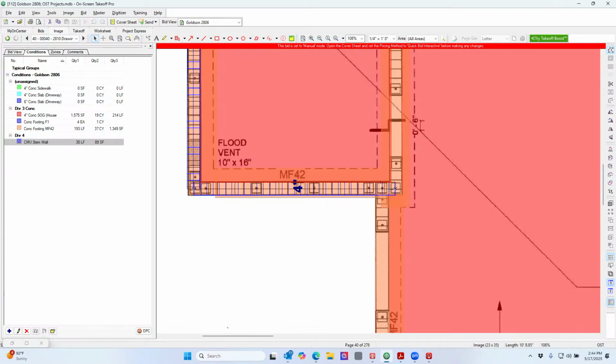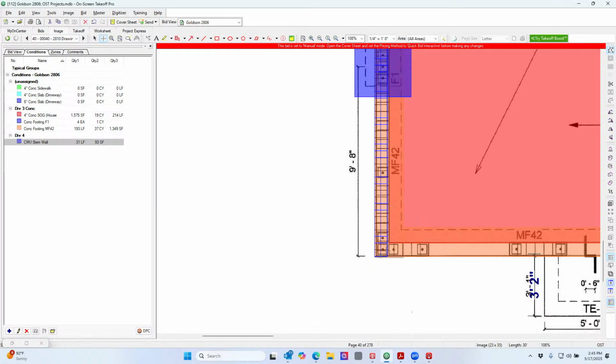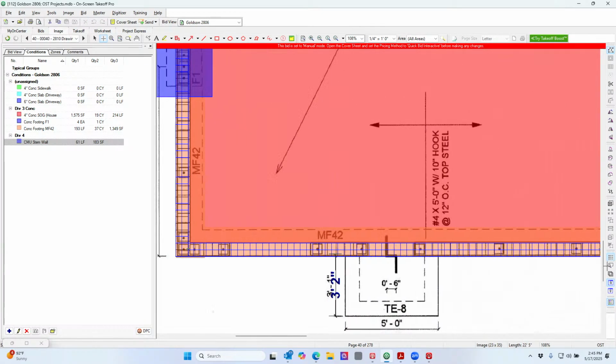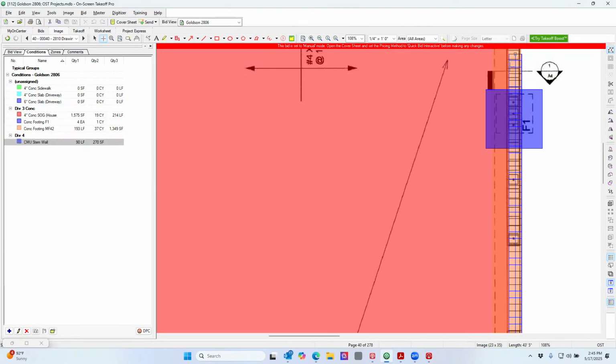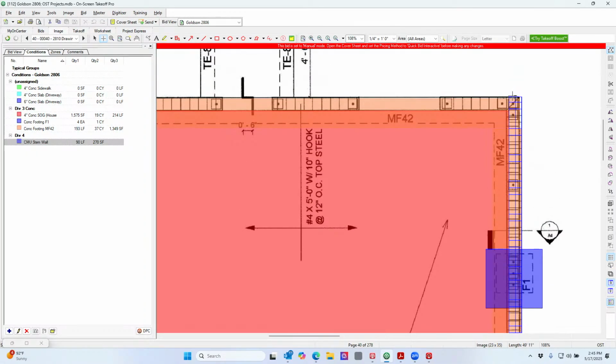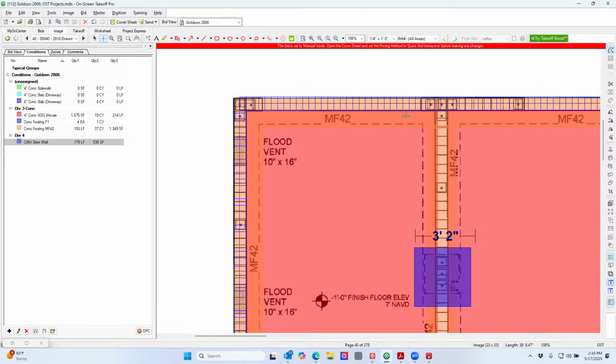So I'm going to go ahead and pull this out a little bit more. You couldn't have built this out of the same element with the footer? No, they're different. Think about it. Two reasons, no. This is masonry and it's a different trade. Sometimes with homes, you can find a mason that will also do concrete. But commercial, they're almost always going to be separate. With residential, sometimes you can find a mason that does concrete or vice versa.